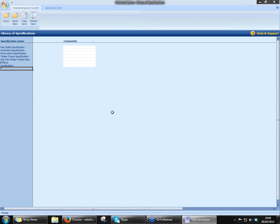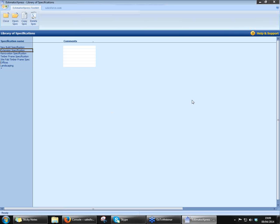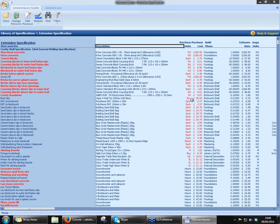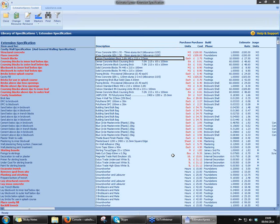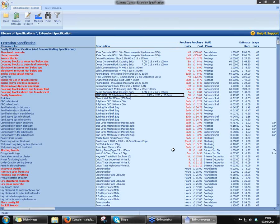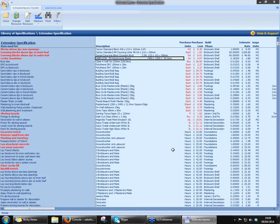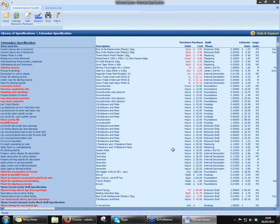Specifications. Your specs are like a big shopping list. What you're essentially saying to the software is every time you build, say, an extension, you're going to use a certain type of brick, certain type of insulation, so on and so forth. Of course, every job's different and you can actually change your spec from within the quote. This is basically giving you a base idea of what you're going to use on a typical job. So if we just open up the extension spec, what you're seeing here is you're saying that every time you build an extension, you're most likely to use this type of concrete, this type of trench block, this type of insulation, so on and so forth. And it's got every material and every trade you could possibly use for building an extension.